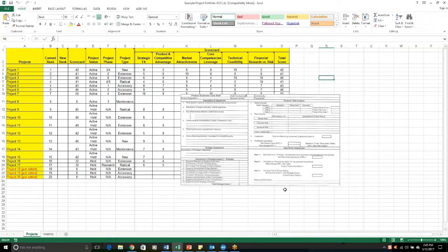One in particular is you can go back to that product business case brief, and I mentioned that out of that can come a single number that accommodates both the estimated revenue that's risk adjusted, and then accommodates for the resources and comes up with a single number that can be used for comparison purposes between different projects. So that's one method. I'll show you a second method here in just a minute.